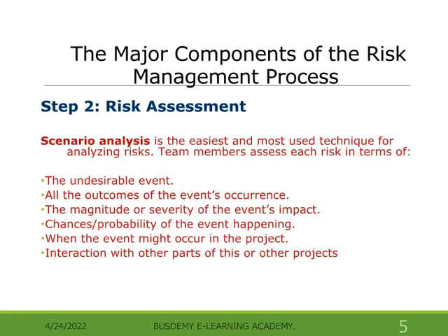Scenario analysis is the easiest and most used technique for analyzing risks. Team members assess each risk in terms of the undesirable event, all the outcomes of the event's occurrence, the magnitude or severity of the event's impact, the probability of the event happening, when the event might occur in the project, and interaction with other parts of this or other projects.